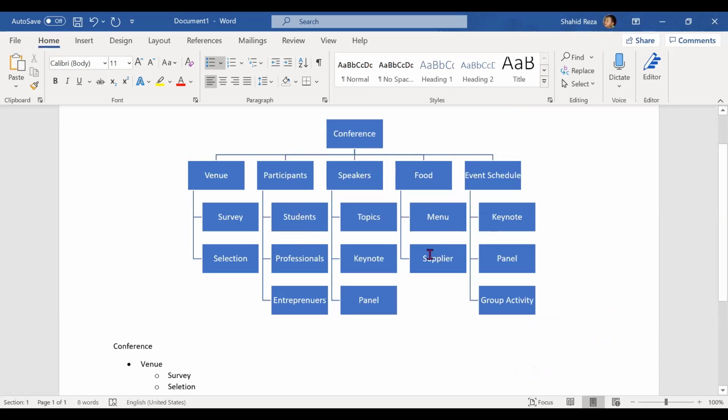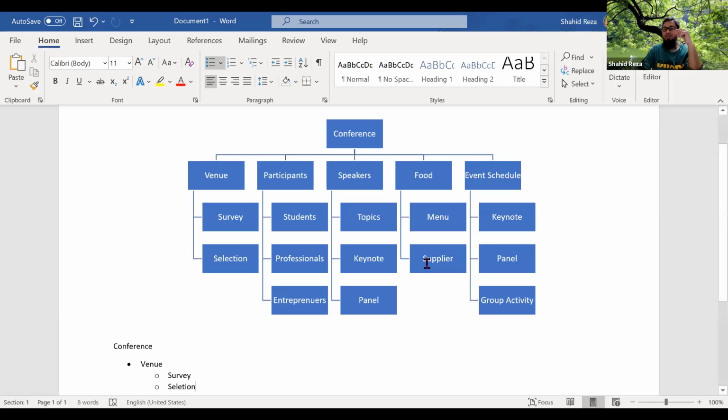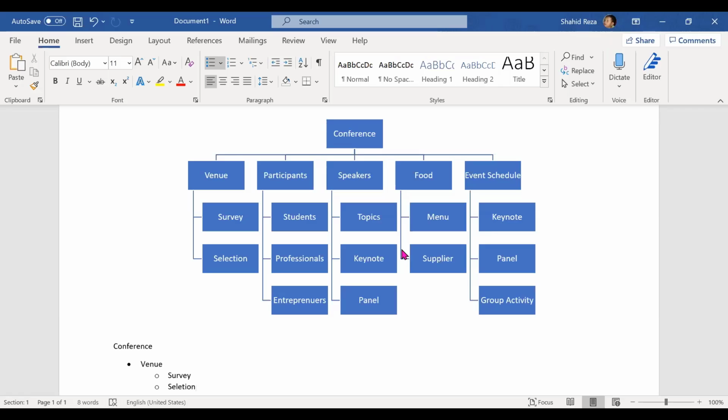Is there any different name for WBS in Agile? Yeah, in Agile they use epic at the top. Under epic they will list the features, and under each feature they will list the stories. Generally they follow this: epic, then features, then user stories. So epic is a big thing, and all the features will make up the epic, and every feature will have a lot of stories related to it. That way they break down. Okay. All right.